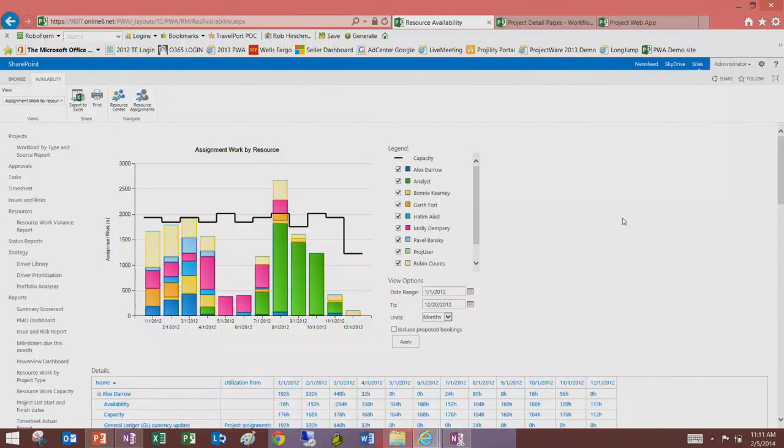Yes and no. If you actually set the capacity of the generic resource to a certain value, 100, 500, etc., yes, it will. But I've talked to a lot of different partners in that field, and one of their best practices is to say capacity for generic resources should always be zero, because they don't produce work. It's a placeholder. It's great to track demand, but a generic resource doesn't produce work, so the capacity should be set to zero. That's the best practice.